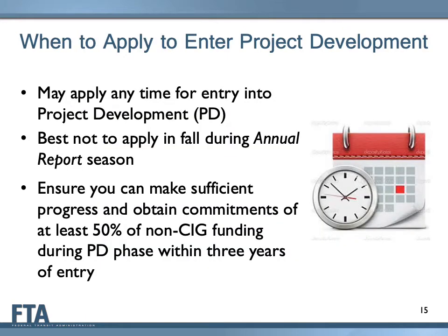Project sponsors decide the right time to apply for entry into project development. An application may be submitted to FTA at any time throughout the year. Project sponsors do not need to tie the timing of their request to FTA's preparation of the annual report on funding recommendations, which typically occurs in the fall. In fact, it is best not to apply during that time, as FTA is very busy with those activities.